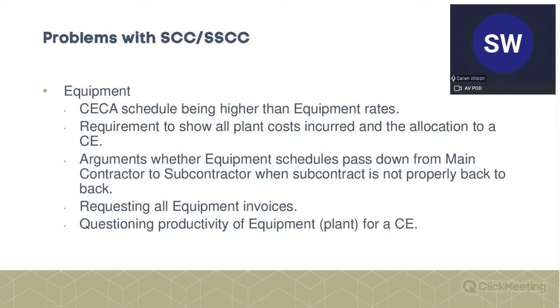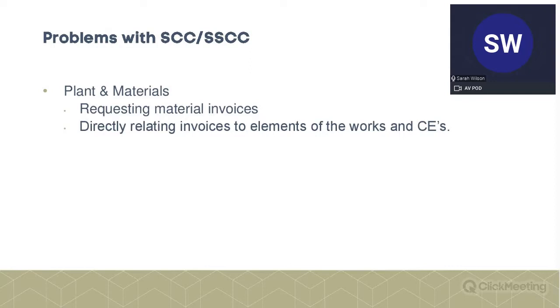And providing all that paperwork, and also the last bullet, which again we're probably never going to get away from because it's always going to be an issue, the productivity. Was it needed? Was it engaged at all times? Could it have been used elsewhere? All those kinds of questions.